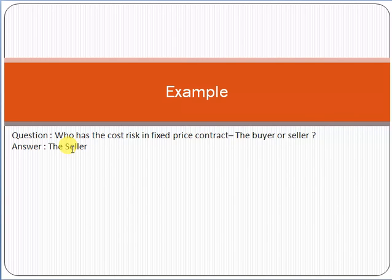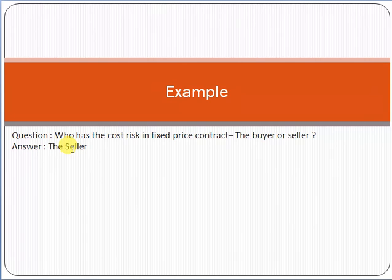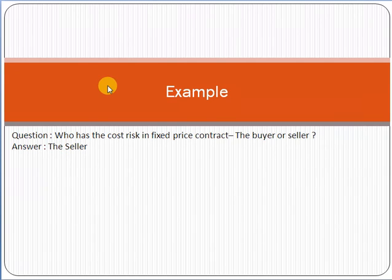Here, who bears the cost risk? It is the seller — the vendor providing the services. There is no risk on the buyer's side, meaning the bank, because it is a fixed price contract. Fixed price, or lump sum, means you agreed to deliver for $5,000 for five months. So the total risk is on the seller's side. If any delay occurs, the seller or vendor has to face the consequences, and there is no risk involved at the customer or bank's side.